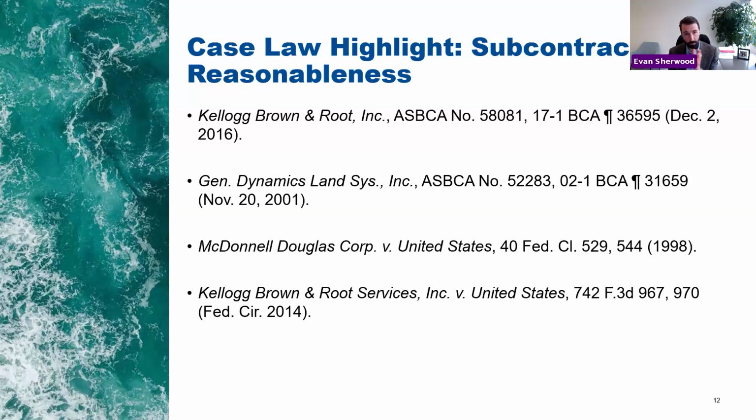We'll get into a couple examples of this later, but contractors may need to downsize staff or downsize their vendor pool after a termination because they don't need the same level of support. Maybe your vendor agreement requires 2 weeks notice before termination. And maybe that was commercially reasonable because your vendor wouldn't have done business with you unless you agreed to that term. Well, in that case, you're probably in a good position to say to the government, I needed to incur an additional 2 weeks of costs after termination because I couldn't get out of that agreement any faster than that.